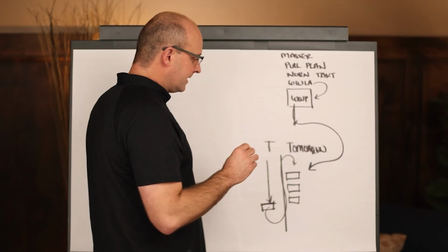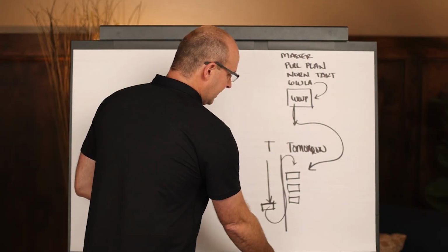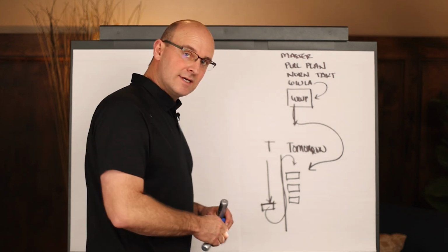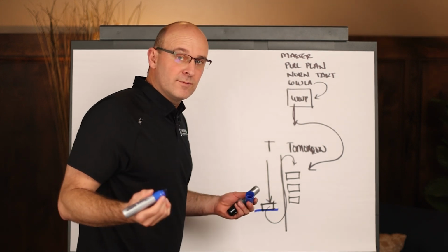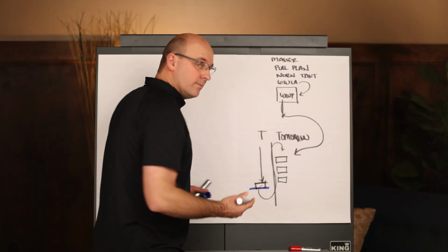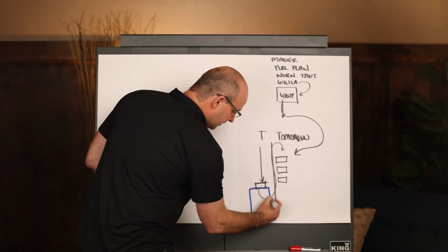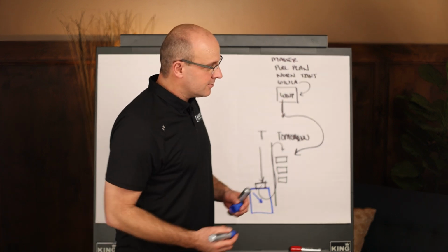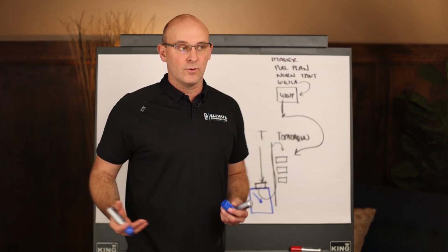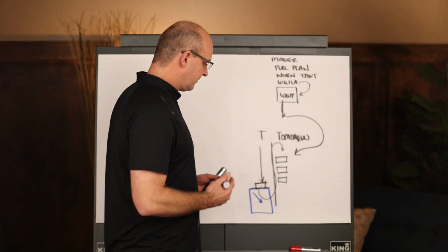Now, the key here is that when you're planning for the next day, that you actually have time in the afternoon. Let's say that you're in the afternoon foreman huddle at like 1:30 and maybe you're done with the foreman huddle at like 2. You have 2 on to go get the generator or the diesel or the extra cord or the ladder or the bit of information or the dig permit or whatever it is that you need for the next day.